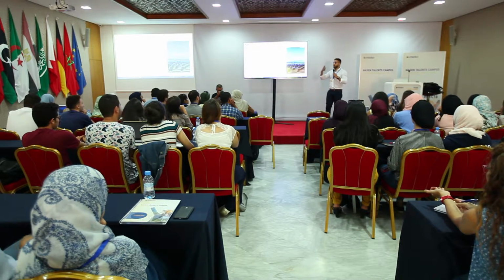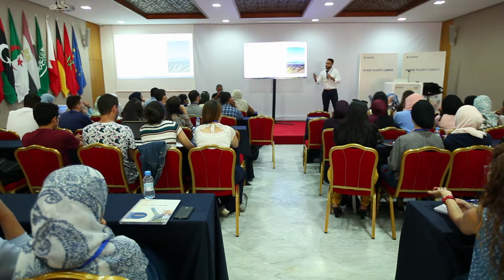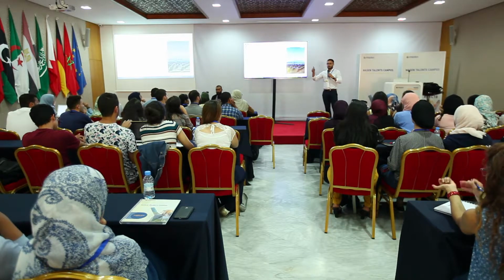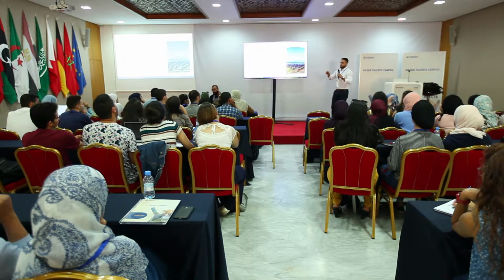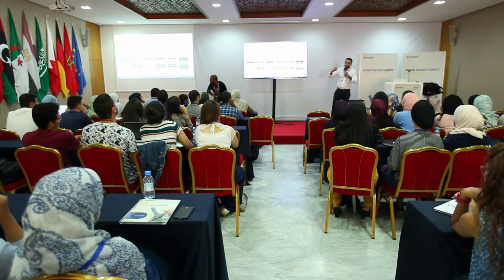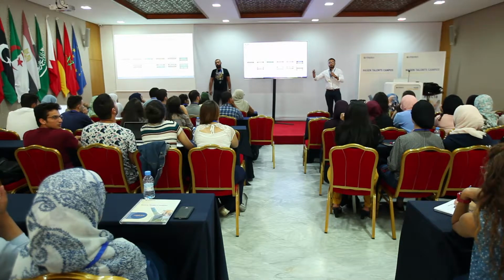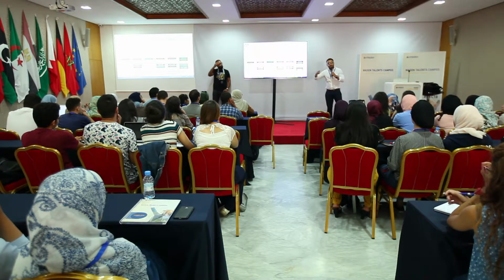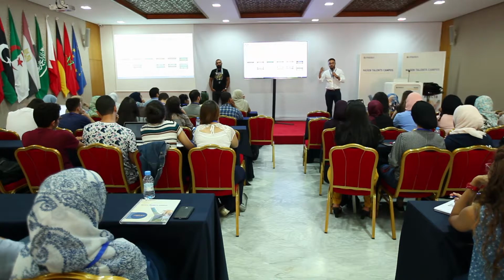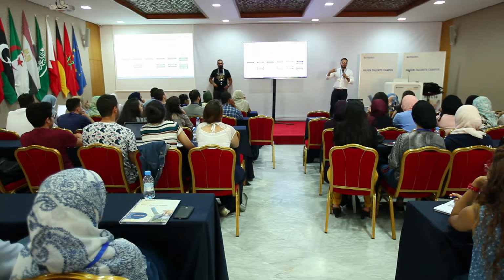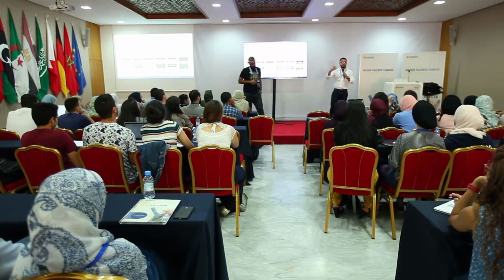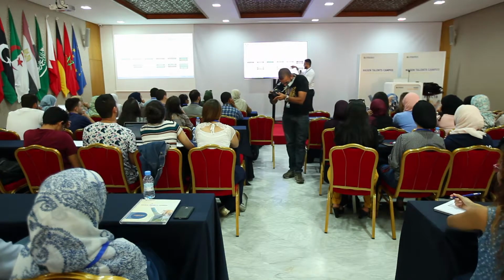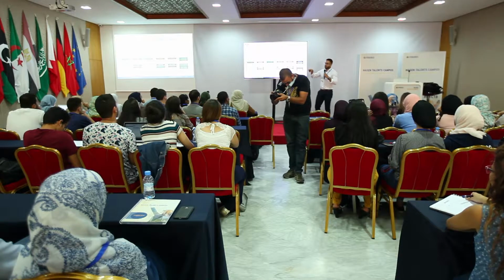So that's already a considerable reduction, and in most cases it's not because it got super cheap to build compared to before. It's just the trust. It actually works to build in Morocco. Masen has acted very well. The banks now realize that there is actually business there. So the ecosystem for these projects was already there, and of course it decreases the cost and builds trust. One of these plants is being commissioned, I think, this month, and the other in October 2018. So this took 5 years, and that took 6 years. And you will see how the new projects evolve. But it just gives you an idea of how long it realistically takes to build a project.